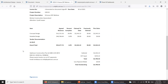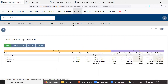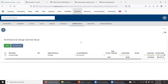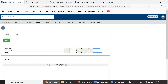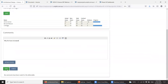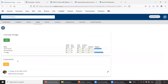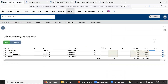I've got my invoice out the door, actuals in, schedule set — now I look at earned value. Going to the Earned Value sub-nav, Concept Design is there, we've got actual costs that came in and the original contract value. There's also a comments thread — I can click on that and get Annie's comment about why hours increased, and you can also link documentation such as draft drawings as evidence of what you're claiming as earned value.